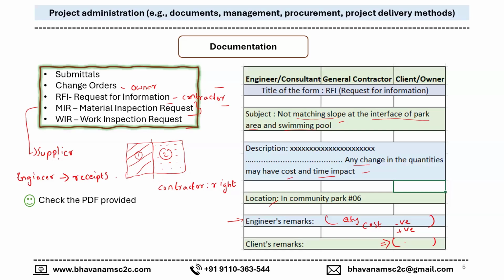That should be enough. When the supplier is not pre-approved, then the contractor has to raise a material inspection request and the material has to get approved. So I'm just letting you know, because these kinds of general knowledge questions will be asked in your exam.